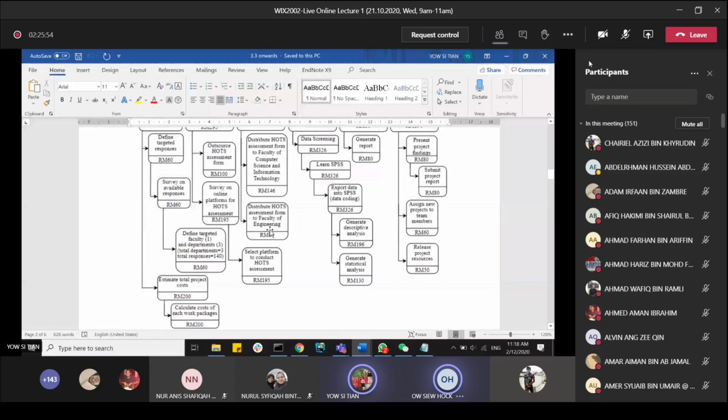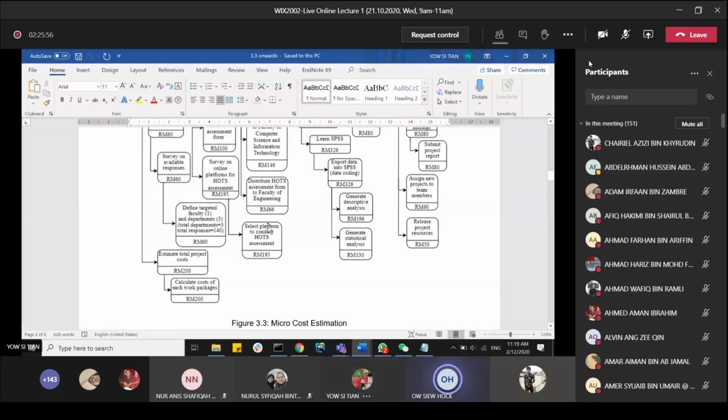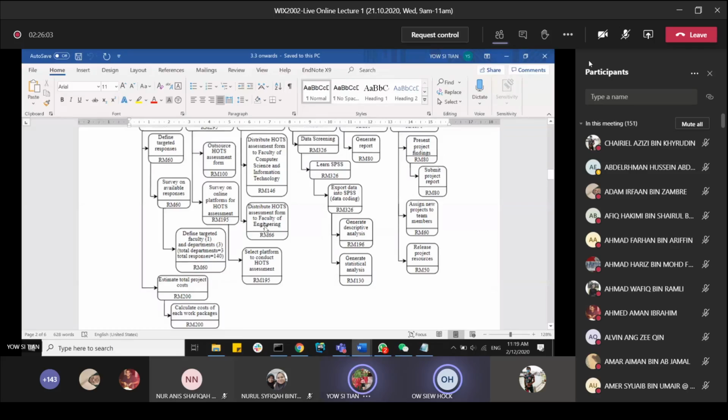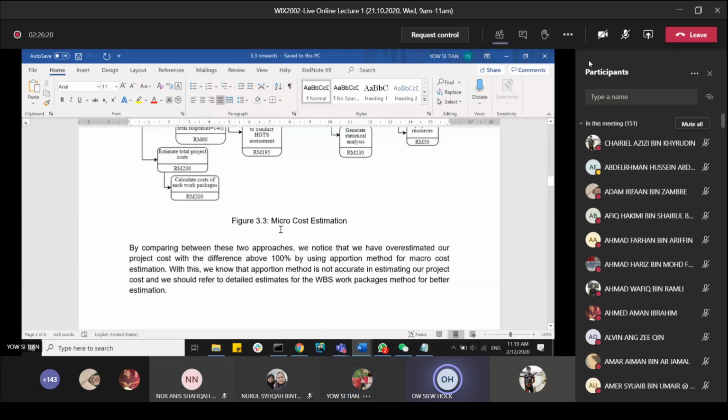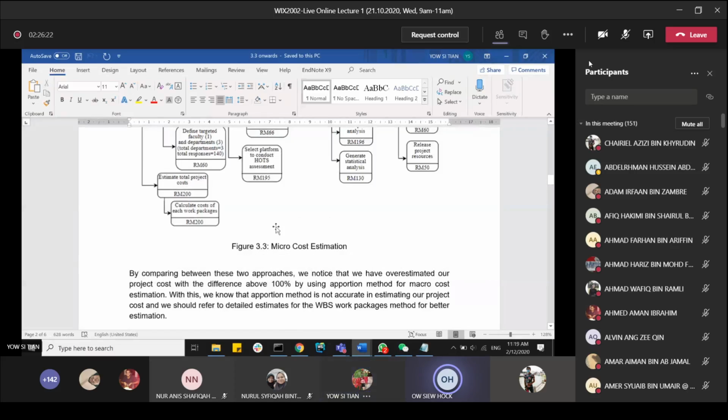Understood? So other teams are asking me what is change management. So you can base on this TG3, T6 experience, you see the whole event. The risk event happened already. And now you make a change because you underestimated. But it's not too late yet. You're just halfway through. You realize it was underestimation. Then you go and make a change and re-estimate. So there's a change you make in the cost estimation. Okay. So the committee in charge of this change management approves, and then you go and update the cost from 1,000 something to 12,000 something. You understand? Then you're safe.